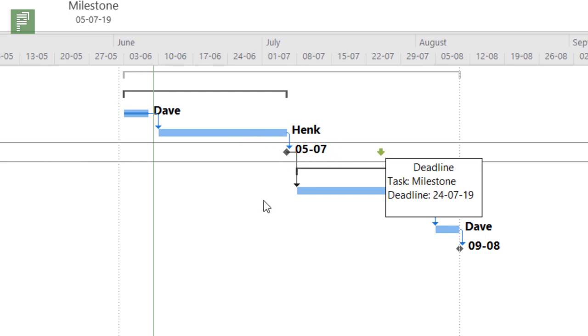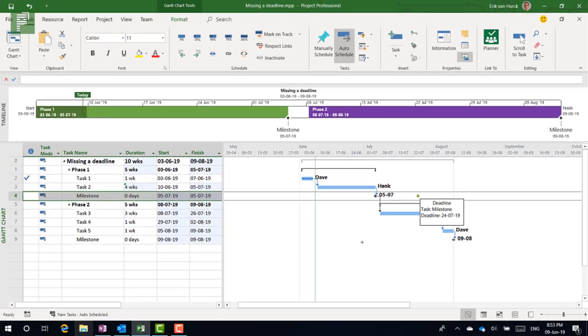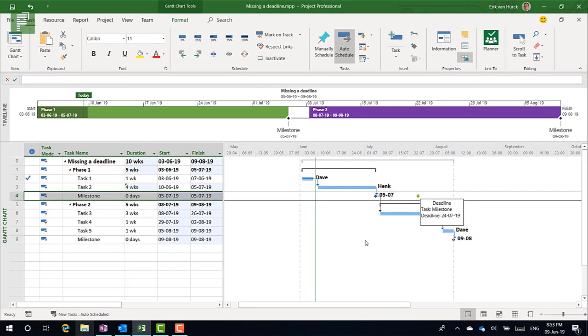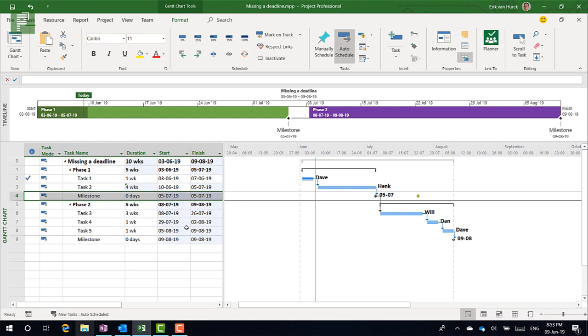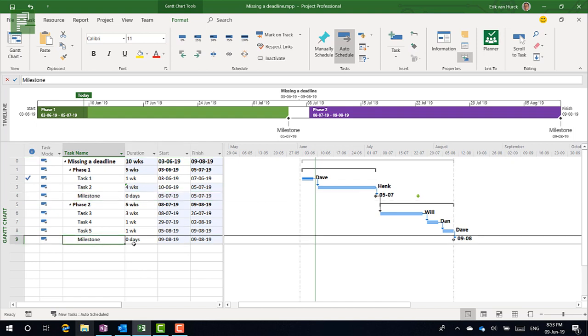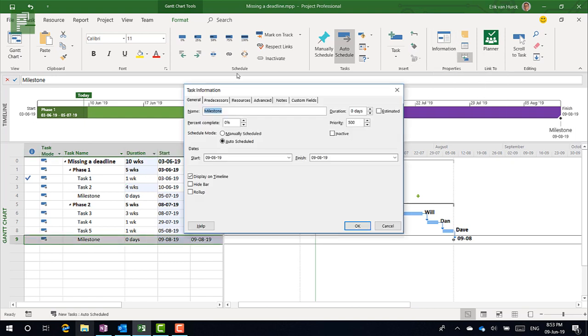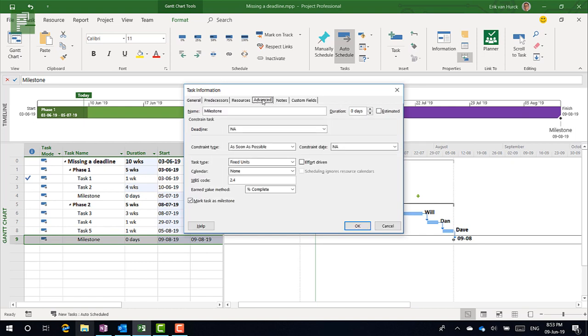So what is the visualization that you get when you overstay, overarch, or surpass that actual deadline that you wanted to make at least? For that I'm going to choose the last milestone, this one, and I'm going to set that to be a week earlier than the actual deadline, the actual milestone. Now previously I did this through the task information pane, and I'm going to show you that again - so task information, and then you have the advanced tab, and in the advanced tab you'll have your deadline.